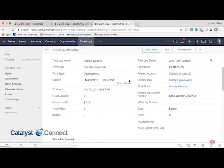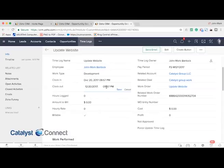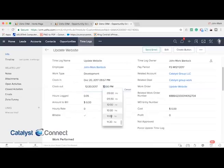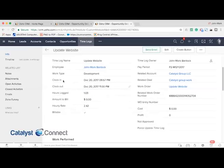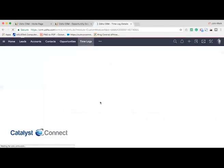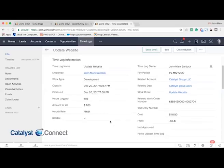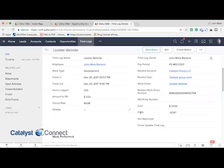What this does is automatically create the time log for the user that's logged in. What they'll need to do is just adjust the clock in and clock out time. You can see it's pre-filled with today's date and time. I'm going to go ahead and edit the clock out to a bit later. You can see that I've logged an hour. Every time a time log is entered and associated with an account and work order, it's going to reference the billable rate for that particular type of work for that employee and that account, and map the hourly rate being billed and the cost for that particular employee. My hourly cost is $50 an hour, and I can see that the amount to bill is a dollar — giving me my actual profit margin for this particular time log.